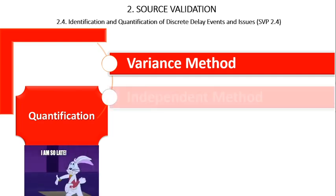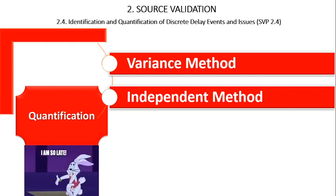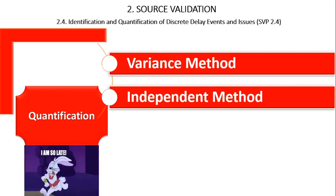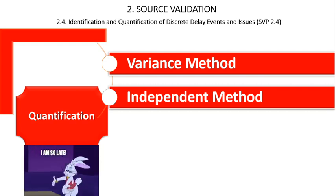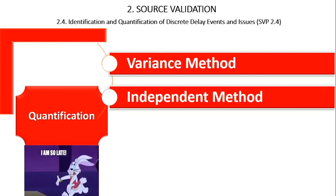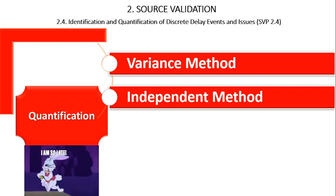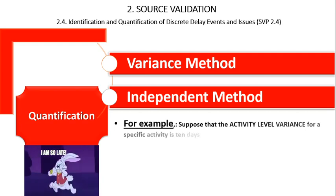In contrast, the independent method is not comparative. The delayed duration is determined from project documentation that contemporaneously chronicled or otherwise recorded the occurrence of the delay, or quantified the impact resulting from a delay event. Under this method, whether causation has been established depends on the type and content of the documentation used for quantification. For example, suppose the activity-level variance for a specific activity is 10 days.